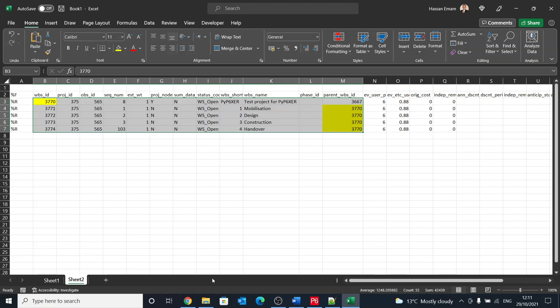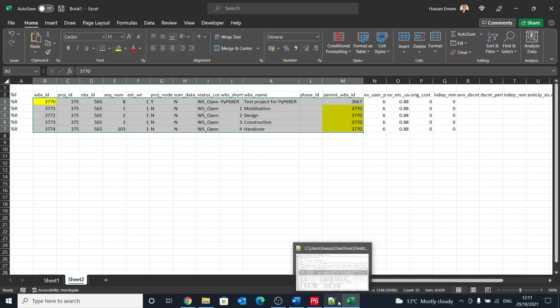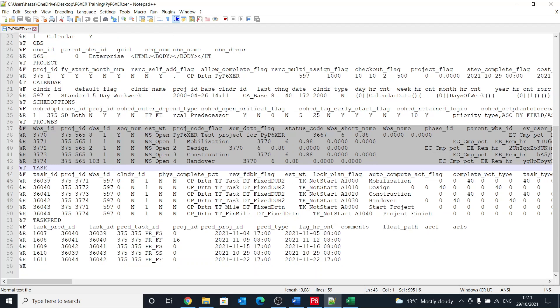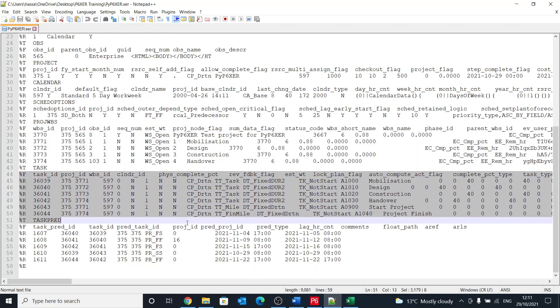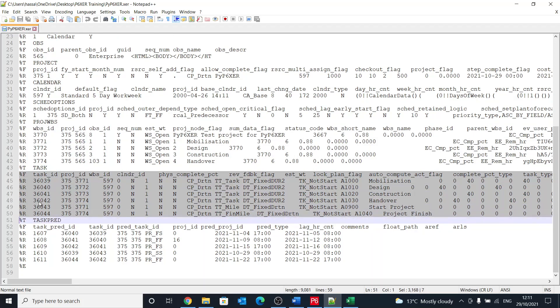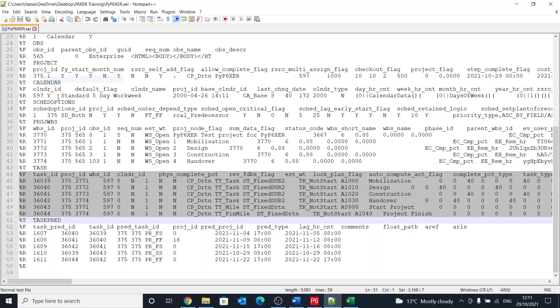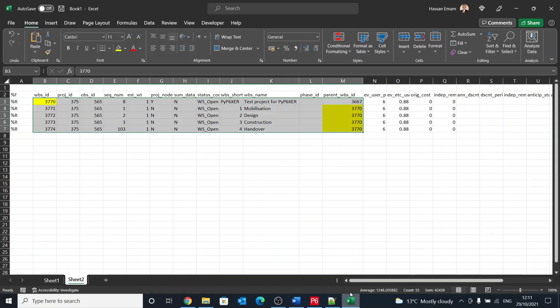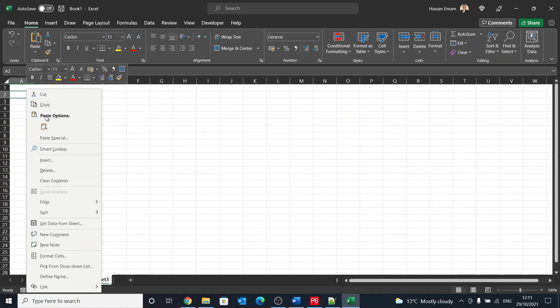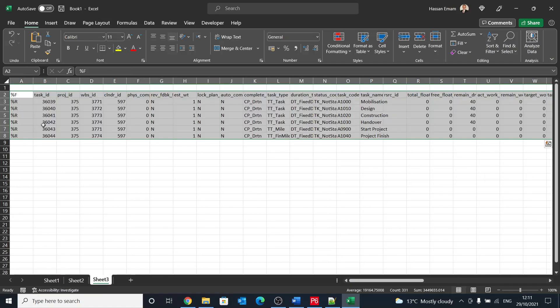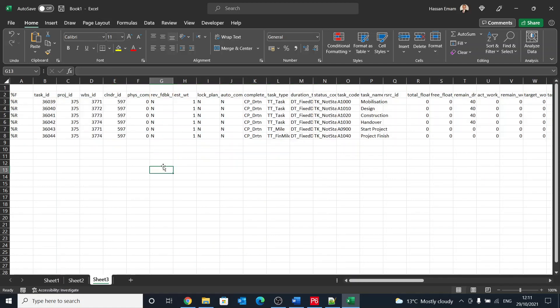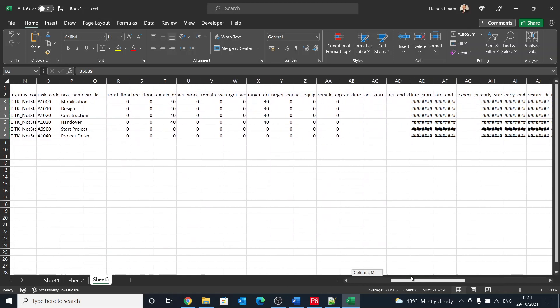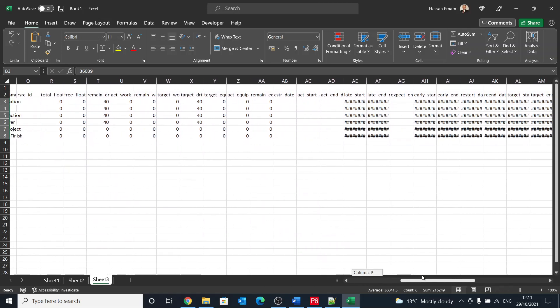Then if we moved on to task, which are the activities, it is the same thing. We have there, instead of having a parent, because it doesn't have a parent, you will have a different concept here. And this different concept is you have the task ID, which is different than the activity ID. So the activity ID is called task code.